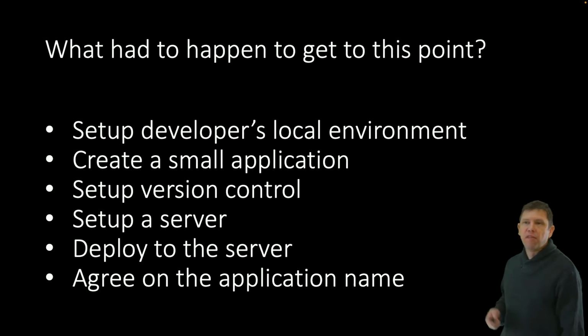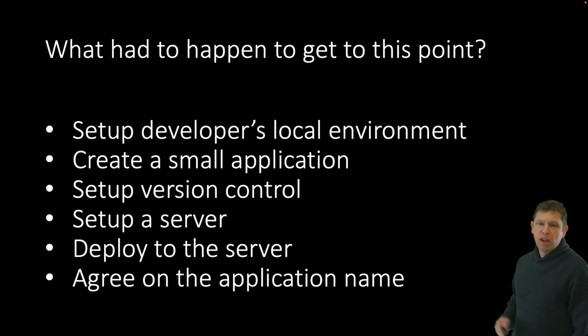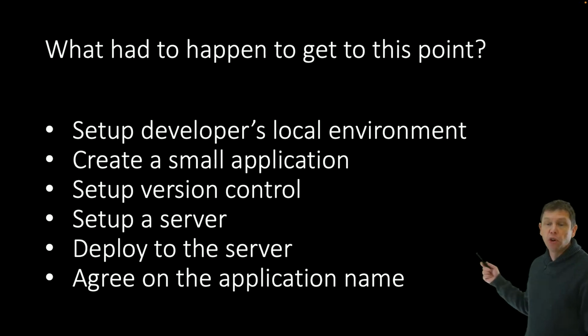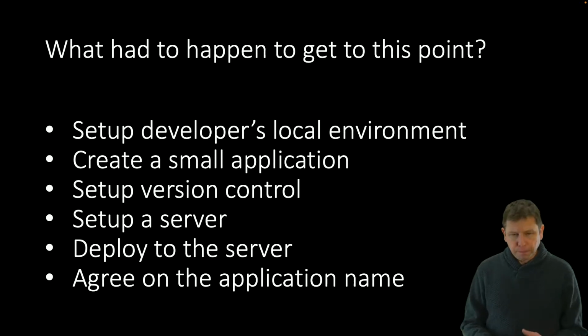We had to set up the developer's local environment. We had to create a small application. We had to set up version control. We had to set up a server. We had to deploy to the server. We had to agree on the application name. And there are probably about 50 other things that happened here that we don't even think of.